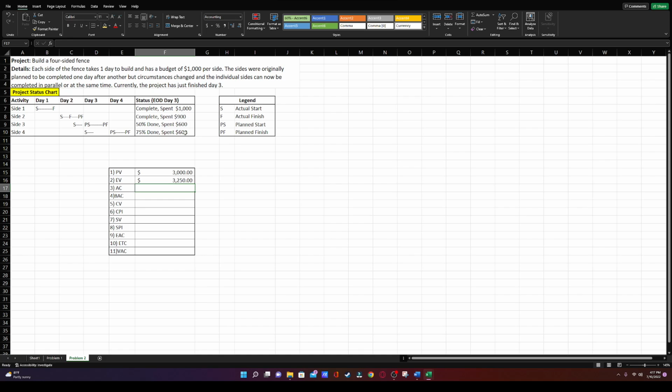Our actual cost, we can go ahead and gather these from here. And let me just do some quick math. That looks like, wow, I'm really challenging myself today, folks. Yeah, 3,100. Perfect. So $3,100 in actual cost. If we sum all these up, $1,000, $900, and $600 and $600. Our budget at completion has not changed from the first one, it's still going to be the budget of all the sides. So there are 4 sides, and each one costs $1,000. So that'll be $4,000. And when I say cost, I meant to say budget. So each one has a budget of $1,000.